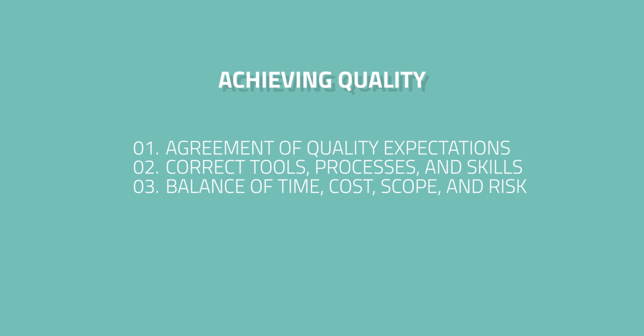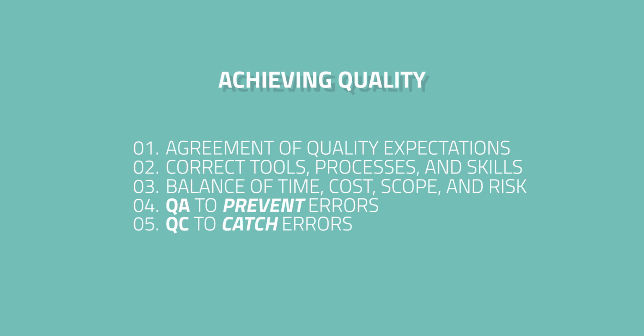There are two terms you should know as a project manager: QA and QC. QA is quality assurance. That's our upfront planning to ensure that quality is built into the project, that we want to do the work correctly the first time. QC is after we've done the work, it's inspection driven, that we want to inspect the work to ensure that quality exists. The goal of QC is to keep mistakes out of the customer's hands. So QA is prevention driven and QC is inspection driven.